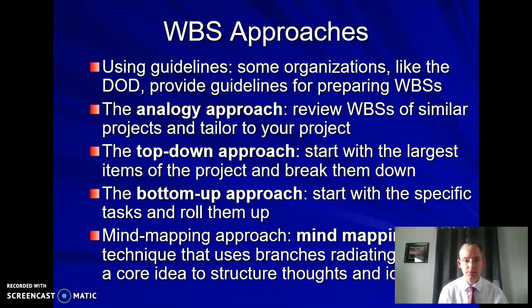I'll let you read through this, but the analogy approach means you can start with something you've done before and make it look like that, starting with another WBS. You can do top down, which says, I know what the big things are that need to get done, now let's break those down into smaller tasks. Or you can do bottom up, where you start with the developer asking, how do we get to where we need to go? Everyone thinks about all the tasks they have to do and you roll them up. The mind mapping approach is a technique that also uses creative ways to get through projects where the actual scope may not be intuitive.